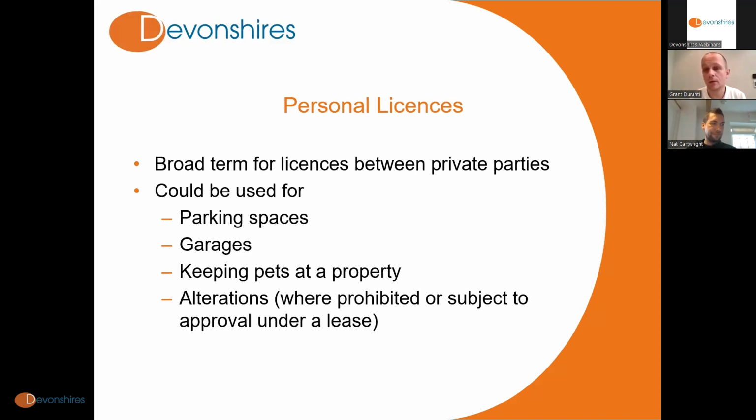And just on leases specifically, it's worth noting that even if a lease prohibits it, that doesn't stop a landlord giving a license to do it and waiving essentially that prohibition. But there's no obligation or guarantee that the landlord will do. But if it so wishes, it can grant a license.